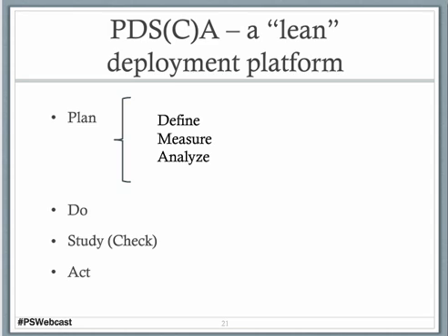The second deployment platform, which many of you may have heard of, it's more popular in our world, is the PDSA, which is the Plan, Do, Study, and Act. Now, the plan actually takes the define, measure, and analyze steps from the DMAIC and puts that into one bucket. Then you improve or do, but you do with what we call a pilot study or a pilot test. And so when we do that, we identify how are we actually going to fix this, but let's test it before we implement it across the practice or with all of our doctors or every day of the week. And we look at our analysis of our pilot project by doing a study or checking on it, and then we act, which is the control phase.